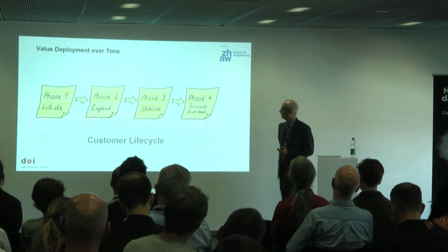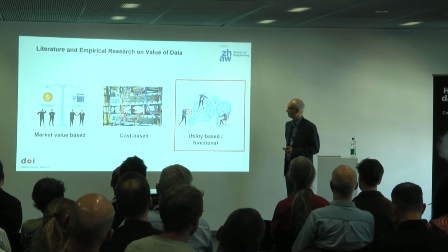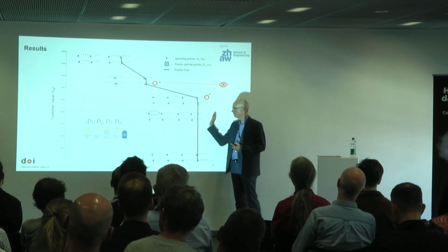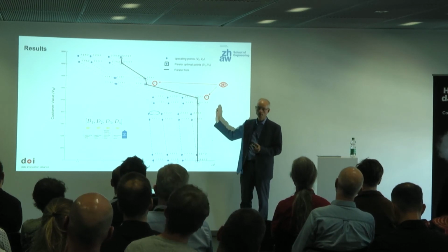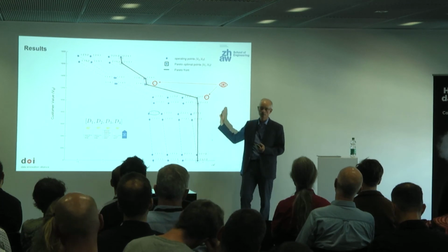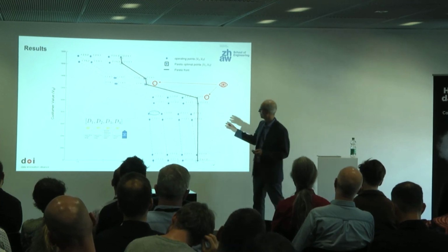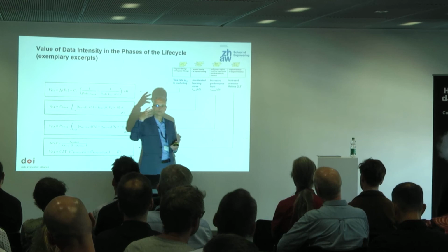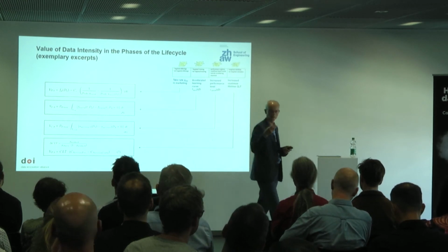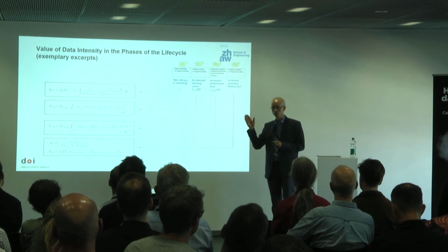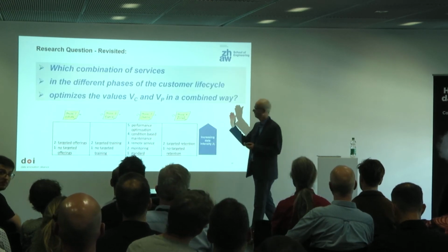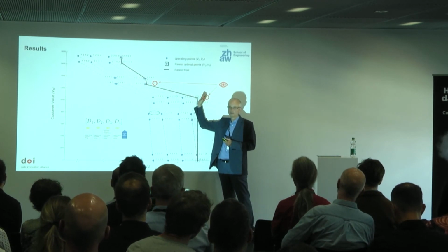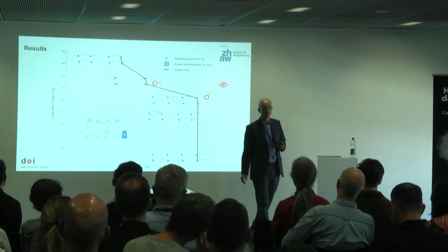That's what we would do in that case, in that curve here. We would create a sample of curves having the extremes, so the range of uncertainties that you included. In those parameters, in those formulas, we include the benefit variables on the benefit side that you say are uncertain. I would do a kind of Monte Carlo sampling, meaning sweeping through the uncertainty range, and find out the sensitivity of these curves, to see whether it is not very sensitive or very much sensitive to that effect.